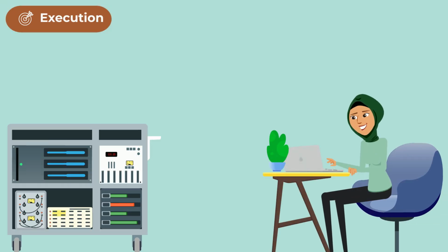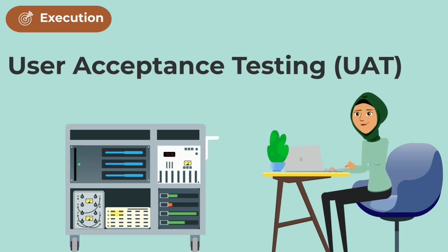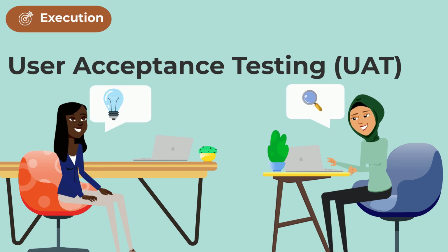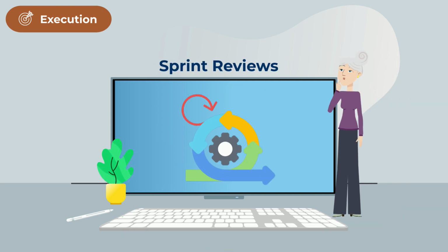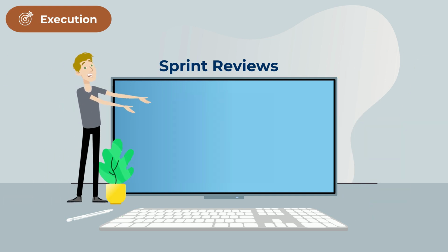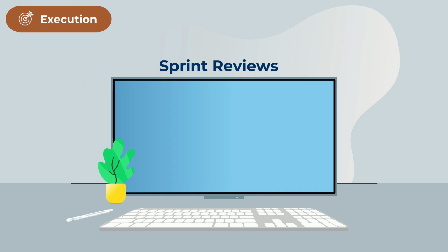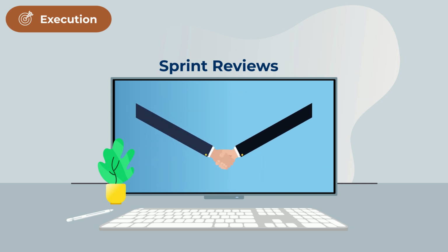After each sprint, we test each new increment, which is a portion of the system, and conduct user acceptance testing, UAT, with select groups to gather real-world feedback. Additionally, after each sprint, we conduct sprint reviews with project partners. During these reviews, we share our current deliverables and invite feedback that will shape our upcoming work. Because of our iterative, incremental approach, no single plan is final, ensuring partner contributions remain relevant as we move on to the next sprint.